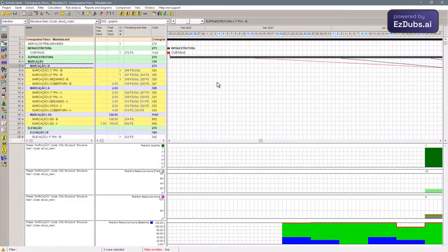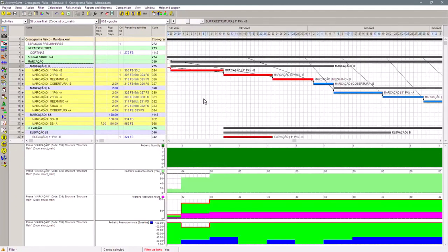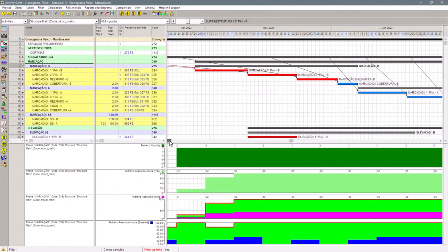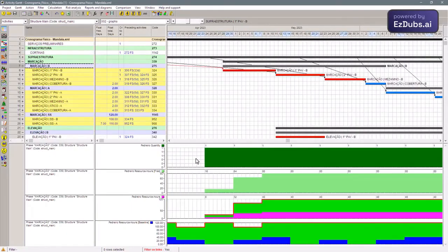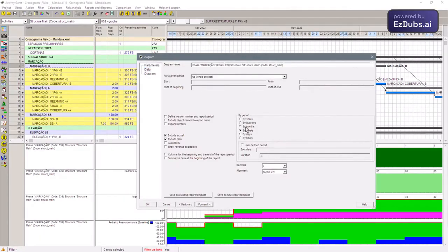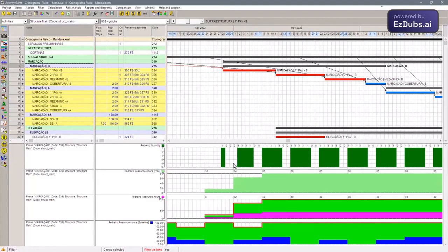So, here, the yellow one. See the graphs. Number of bricklayers on my payroll. Shall we go to the past? Before that, it wasn't necessary to have a bricklayer. But by calculation, in this way of working, I will put it here in days. In this way of working, I have a bricklayer working, a bricklayer not working because it must be a holiday here. These days are not worked. It's a calendar restriction.